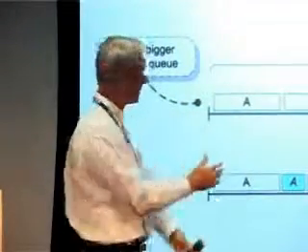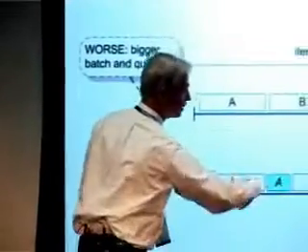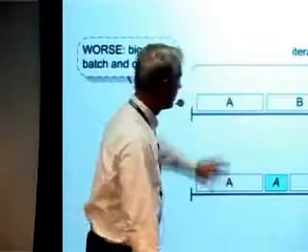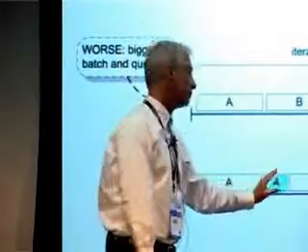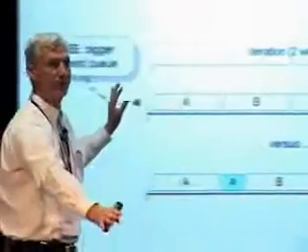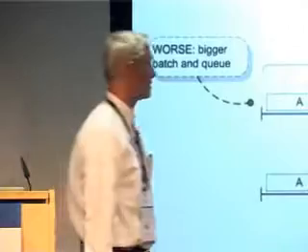Try to move to more concurrent engineering so that if you have to do manual UAT, and this is a 2-week sprint, try to do it after each item. So then the whole Scrum team shifts from developing and they put on their manual UAT tasks. Of course, ideally this whole picture just disappears and we move to acceptance TDD and then this problem goes away. But you'll surely be working with groups where that's not always possible.